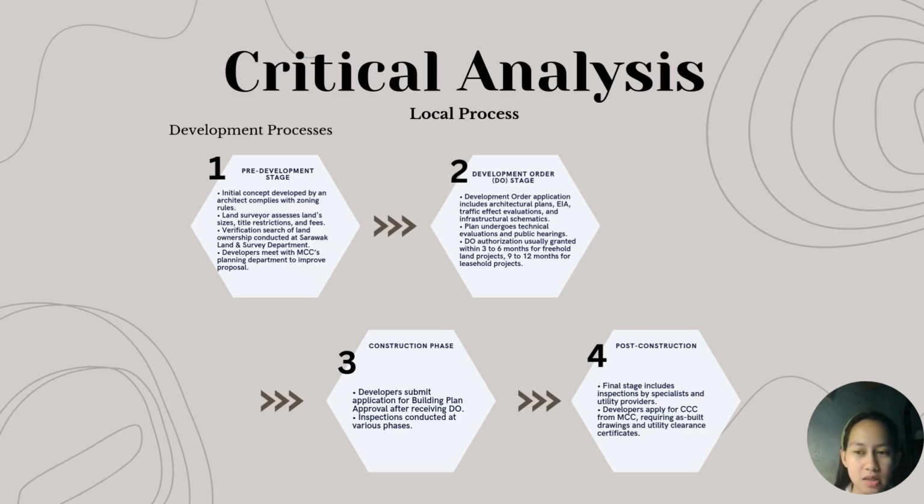In this stage, the initial concept is developed by an architect, ensuring compliance with zoning regulations. A land surveyor assesses the land size, site restrictions, and any lot features. Verification searches and land ownership checks are conducted at the Sarawak Land and Survey Department. Developers must meet with the local council's planning department to refine their proposal.